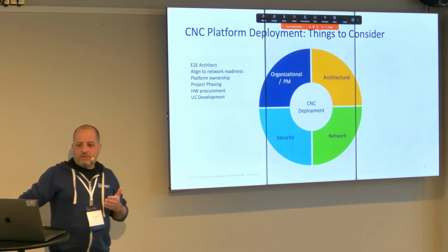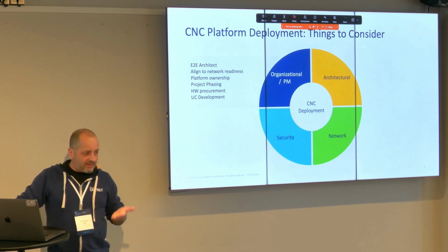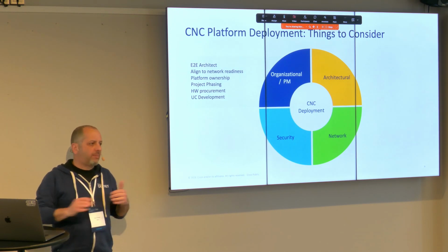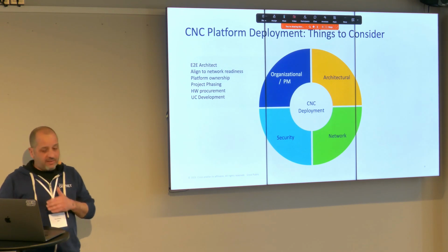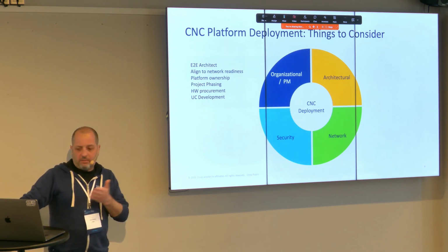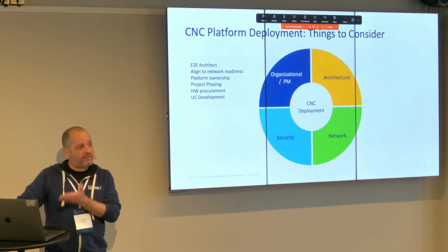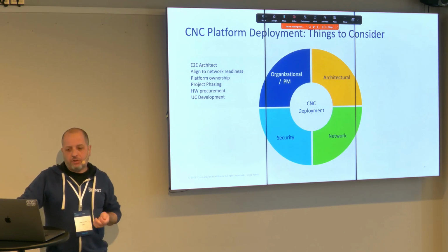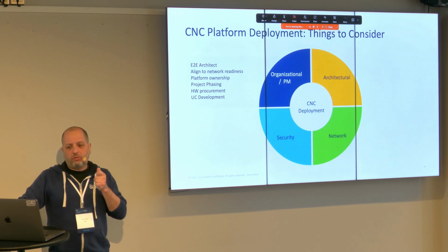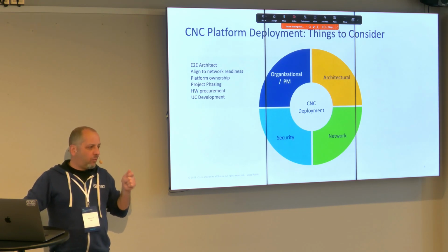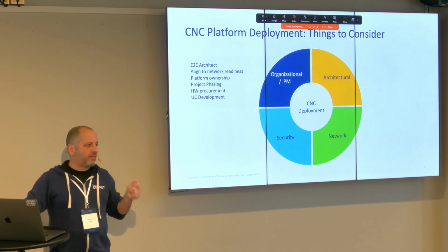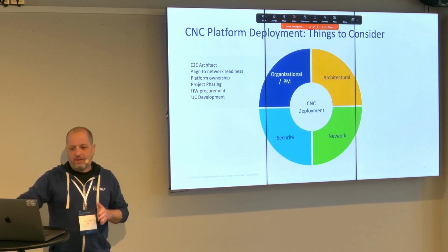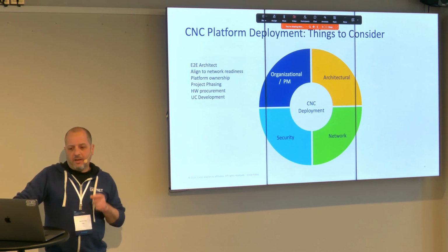The recommendation is to have the project phased. This is not something you want to deploy in one go. You cannot deploy all the use cases that the platform provides. And by the way, the use cases are basically coming out of the platform capabilities that Vishaka already described to you in her presentation. So you need to understand which are the immediate priority for you in terms of use cases. What do you want to deploy, and then build from there. But we will see later.